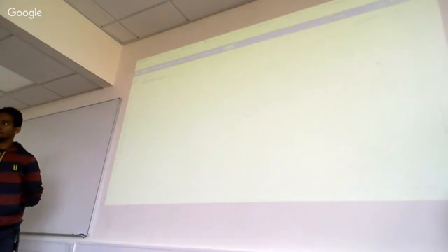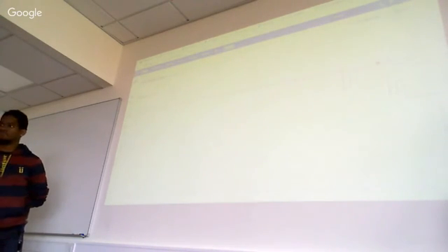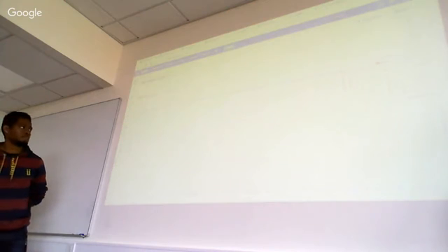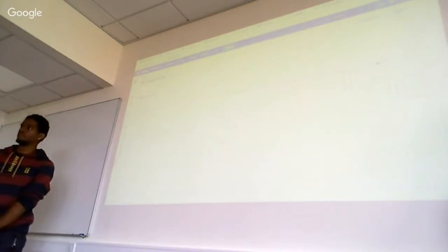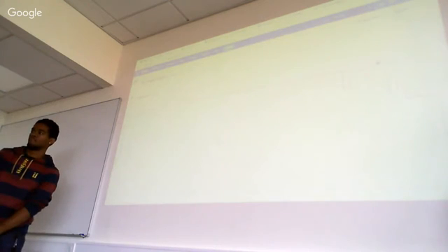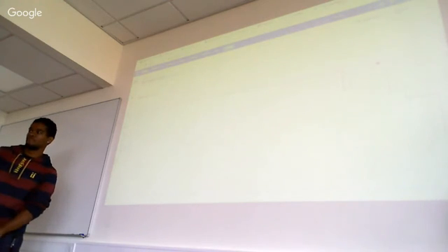So there's something about that change of plan in which you find something is important, you need to deal with it, and it takes time. You need to find another task and push it back in the backlog because you can't do all of that in the sprint. So rather than just adding on new tasks and having the total increase during the project, I think it's better to have that negotiation with the owner when these things happen.